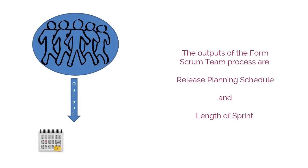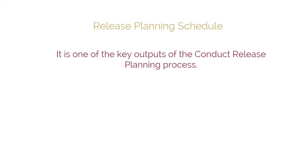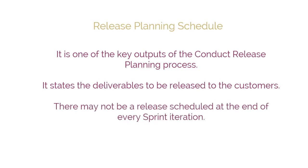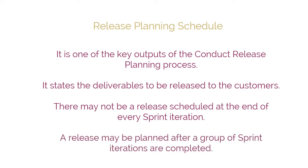The outputs of the Form Scrum Team process are Release Planning Schedule and Length of Sprint. A Release Planning Schedule is one of the key outputs of the Conduct Release Planning Process. It states which deliverables are to be released to the customers, along with planned intervals and dates for release. There may not be a release scheduled at the end of every sprint iteration — at times, a release may be planned after a group of sprint iterations are completed.